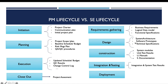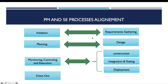The execution phase aligns well with the construction, integration and testing, and deployment phases, because we cannot generate an updated schedule and budget or obtain quality control results and change control logs before finishing all those phases and deploying the software. After finishing all the software engineering lifecycle phases, we come back to close out the project and deliver the project assessment.